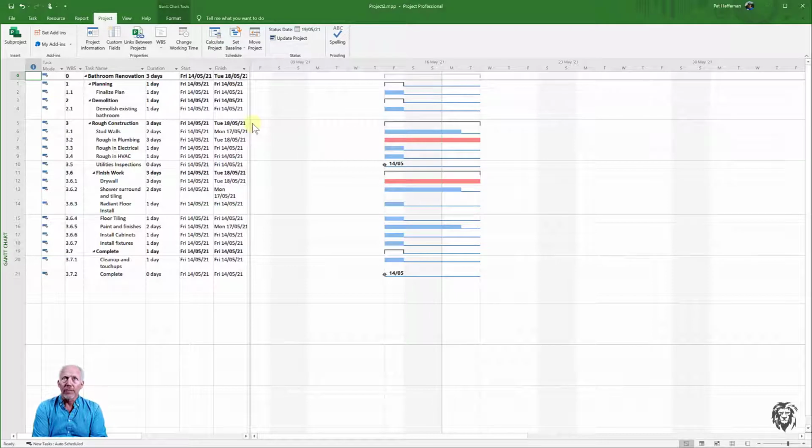You'll see people use these predecessors to basically force the schedule to do what they're thinking they want to do. Because I've had a lot of experience with high tempo projects, I find if we link it up with other than the causal dependencies, it starts to limit our courses of action to achieve our goals the way we would want. So as a general rule, at least on the first blush, go through only adding causal dependencies as your predecessors.